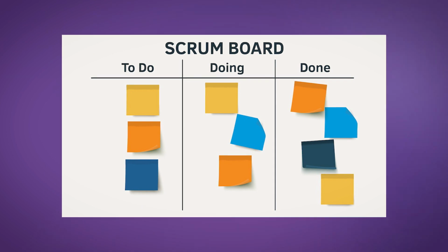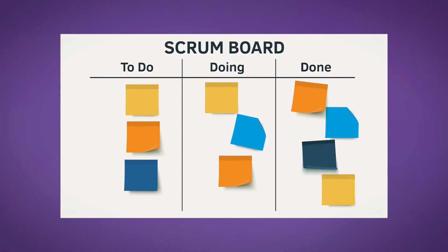This doesn't need to be any more than 5 or 10 minutes. It can be even 15 minutes, but probably don't make it any longer than a 15-minute huddle. Here's what you want to do. You will want a scrum board on the wall in your huddle area. The scrum board will say backlog, in progress, and done.